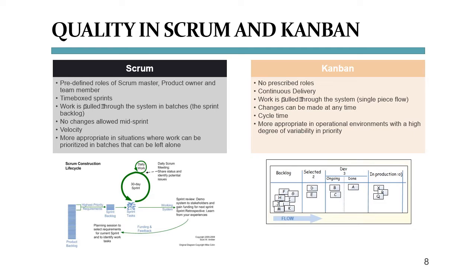Instead of time boxes and review rituals, Kanban concentrates on flow, measured flow really. On the Kanban board, you can track the status and the location of a work item in the production queue immediately. Since work in progress limits restrict the number of items in a queue in order to focus on producing deliverables rather than unfinished parts, developer work is essentially flexible and can take many forms. This variety can make the workplace more interesting and less stressful. Lastly, Kanban can be used with time boxes or without, but its lowered rigidity can lead to better outcomes and happier people all around.